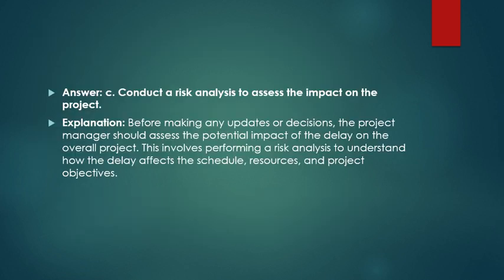Answer is conduct a risk analysis to assess the impact on the project. Before making any updates or decisions, the project manager should assess the potential impact of the delay on the overall project. This involves performing a risk analysis to understand how the delay affects the schedule, resources, and project objectives.